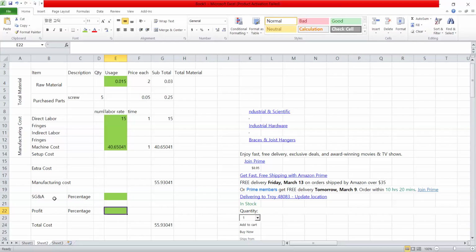If you ask me what is included in this one, the company president's salary will be included, the cost engineer's salary, purchasing, your sales department, and your headquarter cost, not the manufacturing floor, the headquarter, the laptop they give you, and if we are visiting a supplier, there will be some cost for traveling. All of those factors they estimate here, and finance puts those numbers together, calculates a percentage, and gives that percentage to you.